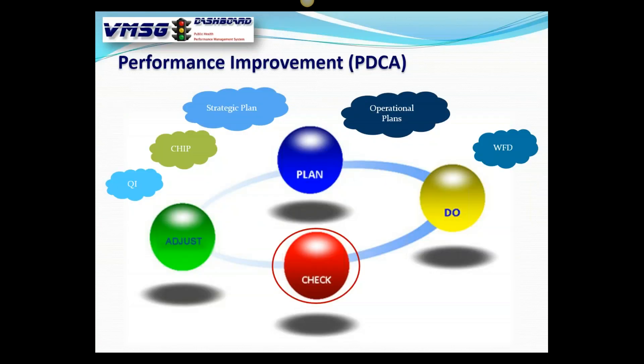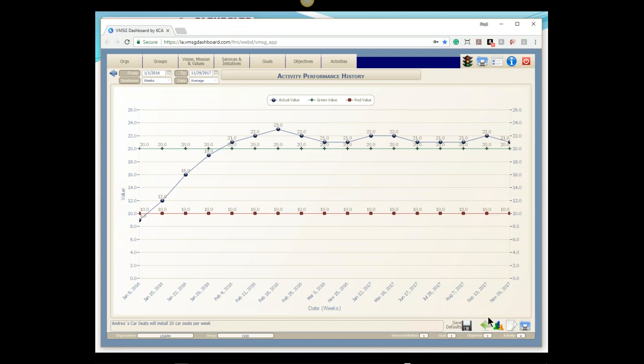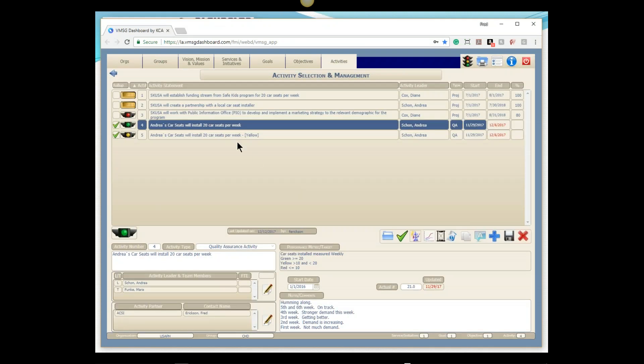This chart is what we call micro-level performance monitoring — a single activity over time. Looking at this chart, we ramped up over about four weeks and then stayed above the target of 20. Everything looks great. Back in the PDCA cycle, the next phase is Adjust — in this case no adjustment is necessary. Our actual values are right at the plan number, so we'll put it through the cycle again, maybe another quarter, check that chart, and if we're still above 20, continue on.